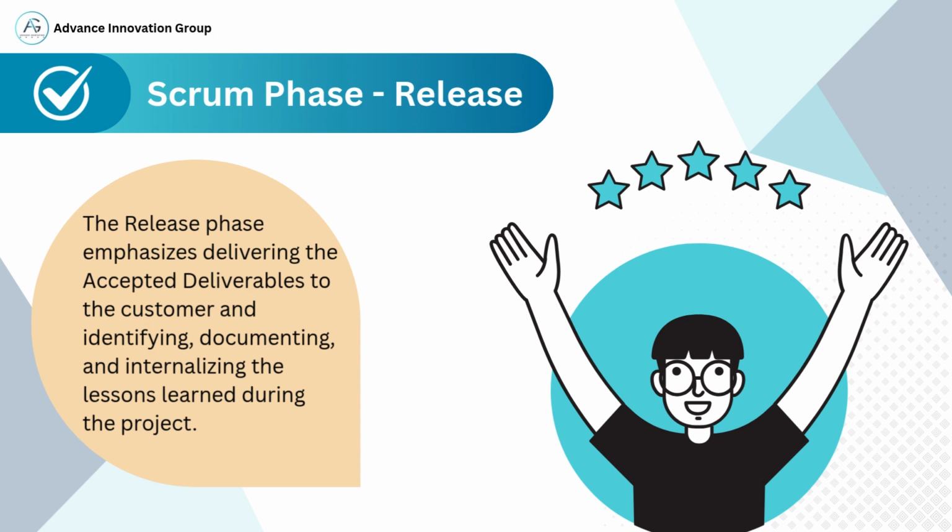11.2 Retrospect Sprint. After deliverables are validated, the team turns inward to reflect and improve. Inputs include: 1. Scrum Master, who facilitates open discussion and reflection. 2. Scrum Team, which provides insights on performance and collaboration. 3. Outputs from Demonstrate and Validate Sprint: what was accepted, what wasn't, and lessons from that experience.